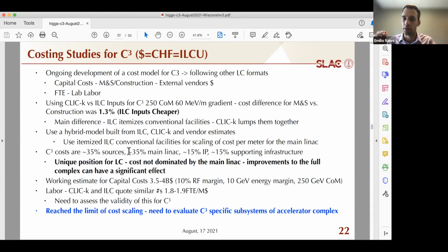And then I think you asked, what is the fraction of civil construction, or conventional construction? Usually they are separated as the total cost of all tunnels and all civil construction, like service buildings and all that stuff. So out of this $4 billion, what would be the cost of this? I could tell you, with a little asterisk that I'm going off of my memory, but I have those numbers specifically if you're interested, and I'd be happy to share them in detail. But roughly, I think it comes down to about a quarter of the overall system.